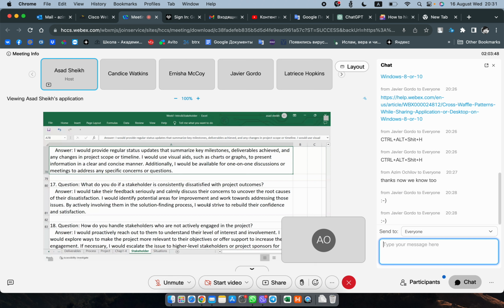There was one stakeholder I remember. She was upset, and we figured out the reason she was upset was because the team were working on the research for a couple of weeks, and they had not included her or updated her on what was going on. She was thinking, hey, what is the team doing? And so we said we're going to provide a weekly update to the stakeholders, so then she knows that we're doing something. We're not just sitting and doing nothing, right? She was in the background just worried, maybe the guys are not doing anything. They were doing something, but they just did not inform her of what they were doing. So she was dissatisfied.